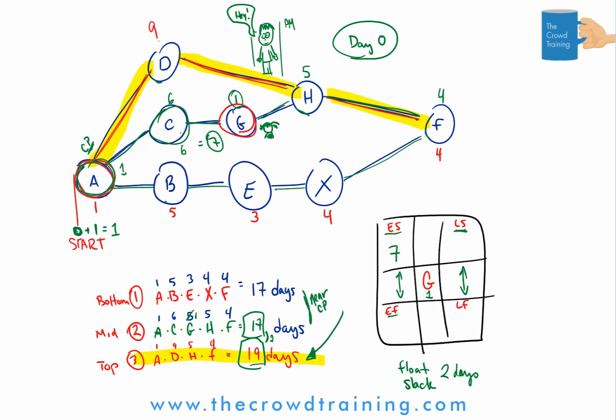And also let's finish with, if we do in fact start on day 7, what's the earliest we can expect it to be finished? Well, if its duration is a day, then you add 1 day to 7, and simple math, it's an 8. So we're expecting it to be done at the earliest, day 8.